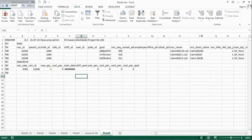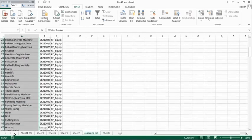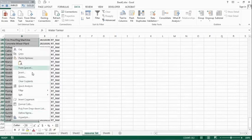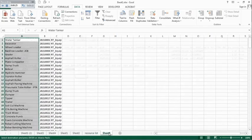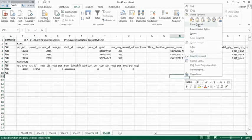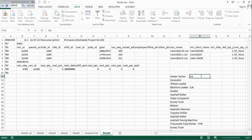Before we start the next step, you must have a list of the resources that will be used in the project and that these resources are classified according to the type of each of them, whether they are materials, labor, or equipment. Then transfer that data in the appropriate fields in the file that was previously created, as shown in the video. Many of the data will be repeated as it is in front of each new resource added to the list. The modification is limited only to the identification code, the name and type of the resource, and all data for the three main resources are kept as they are.